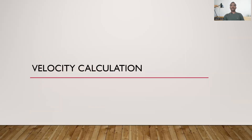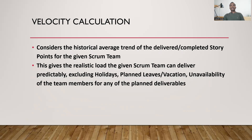Now moving on to velocity calculation. The velocity calculation comes into context when you have some historical sprints to look at. We take the average trend of the delivered or completed story points for the given scrum team. The velocity should be calculated individually for each and every scrum team — it shouldn't be averaged across all teams. The same way we calculated capacity individually, we calculate velocity individually for each scrum team.